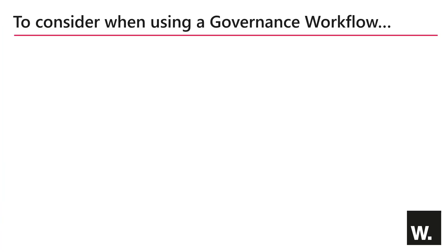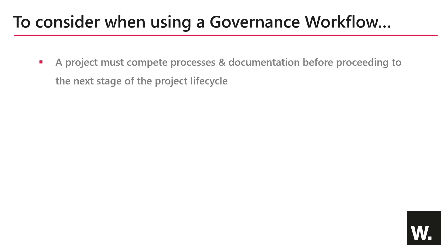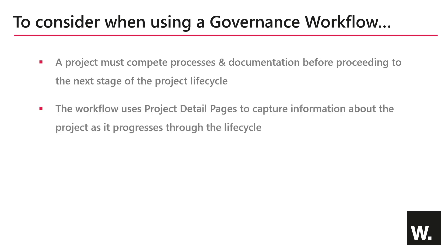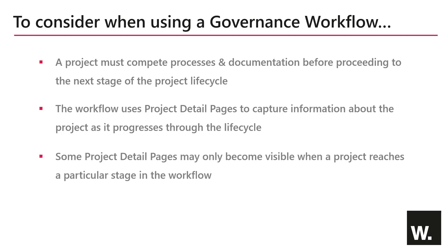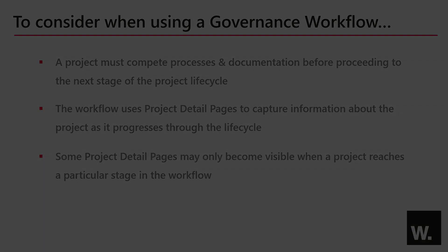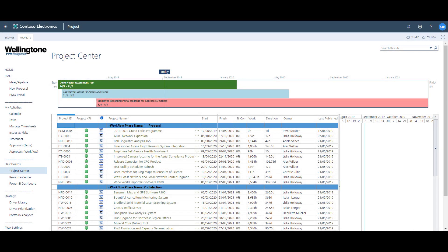Some things to consider when using a governance workflow are that a project must complete the necessary processes and documentation before proceeding to the next stage of the project lifecycle. The workflow in Project Online comprises a number of project detail pages used to capture information about the project as it progresses through the lifecycle, and some of these project detail pages may only become visible when a project reaches a particular stage in the workflow.